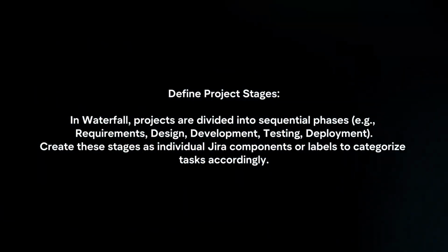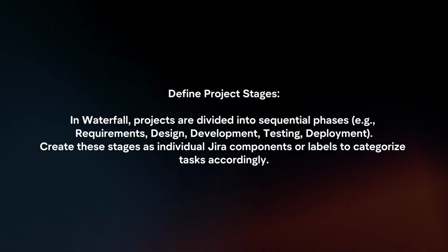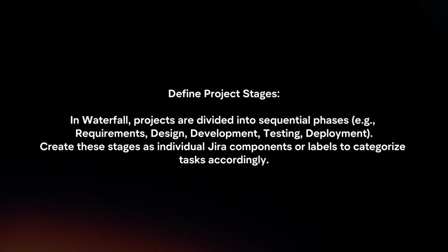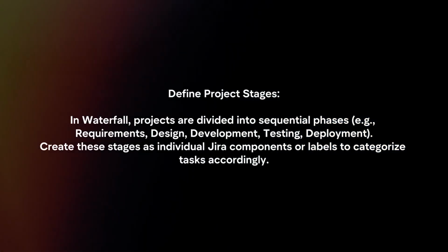Define project stages. In Waterfall, projects are divided into sequential phases. Create these stages as individual Jira components or labels to categorize tasks accordingly.